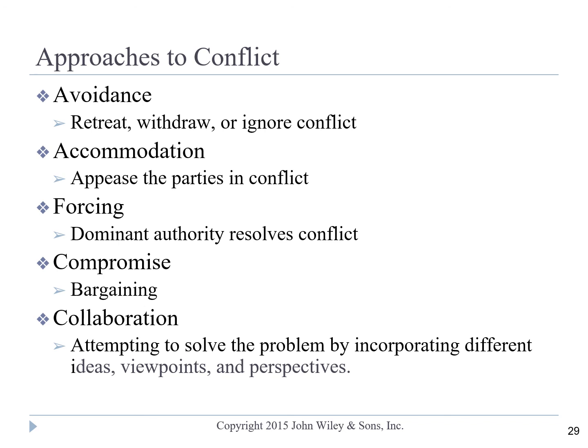There are a number of ways we can deal with conflict. As we mentioned, we can avoid conflict by basically ignoring it and retreating or withdrawing from the situation and hoping for it to get resolved by itself. As we have talked about, that typically does not happen. Another approach is to accommodate the opposing party by trying to appease them and basically give in to their demands and give up what we are looking for.